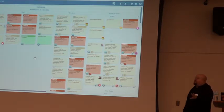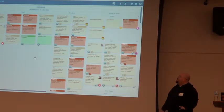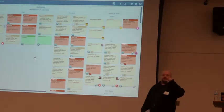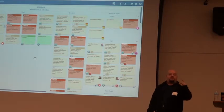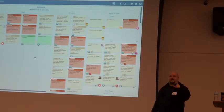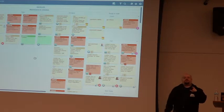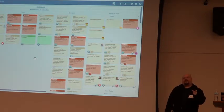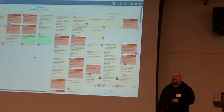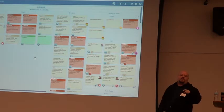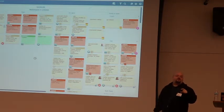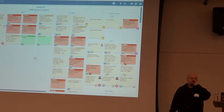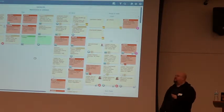So we do two points for a day, right? One point's a half day with two points as a full day. And we mark each card with how many days it is. The general idea, we really, really, really, in an ideal world, we want one of these cards to be one day's work. That's one day's work to implement, to get code reviews, to get through continuous integration, and to land. So practically, most things end up being like a three. If a task is large, then we look to break it down, to try to fit it within little one day iterations. And that gives us a bunch of great things.